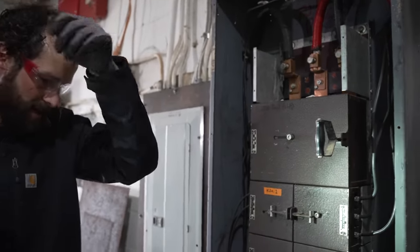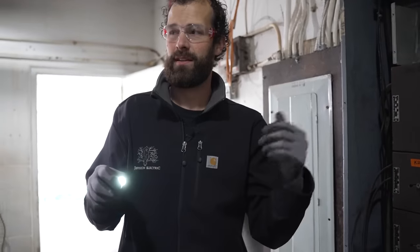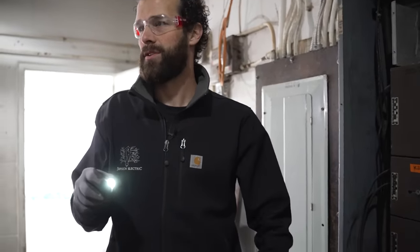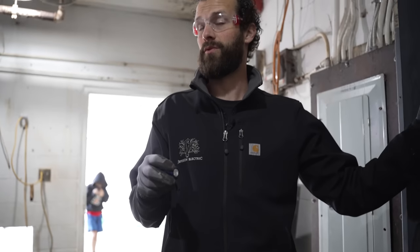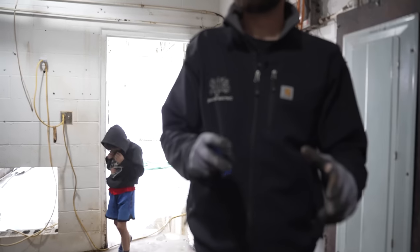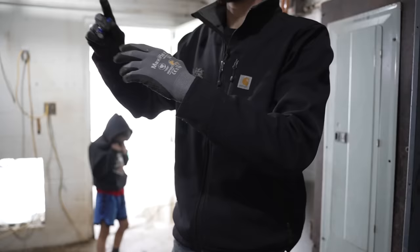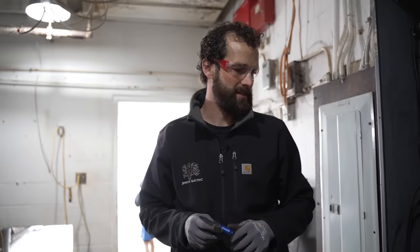July 14th, yeah. So you can almost guarantee without substantial expediting fees, like $10,000, $20,000, that this equipment's not gonna be in by then. So the question is, how do we get it safely across the July 14th finish line and then plan for something future? And maybe, you know, sometimes I get it, budgets are maxed out. So maybe future is 12 to 24 months, not 6 months. Right. But if we can get the pieces together in front of you guys, you can make the big picture decision. Then I think we're dollars and cents ahead there.